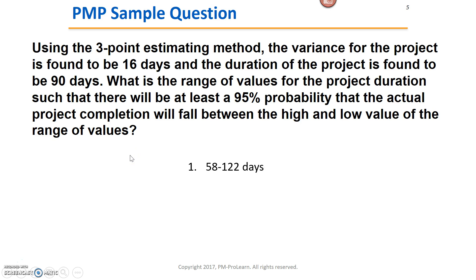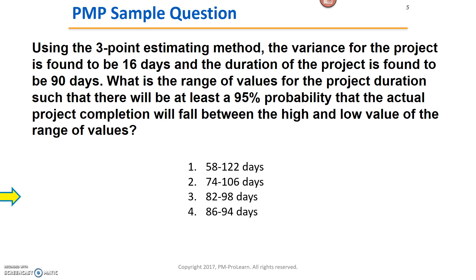Let's look at the answer choices. Is 58 to 122 equal to 90 days plus and minus two standard deviations of 4? No. The answer is 82 to 98 days. If my duration is 90 days and my standard deviation is 4, and I want 95% probability, I take 90 plus 8 and minus 8 — that's two standard deviations — and I get 82 to 98 days. That range gives me the target I can be 95% confident my team will actually complete the work within.